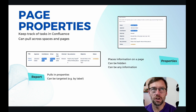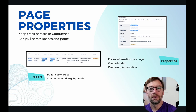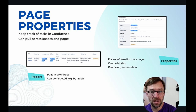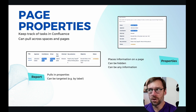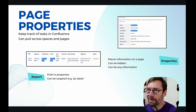There's another macro I like to use, especially when I have multiple projects, called page properties. This is an area on a page that can include information like the project owner, main stakeholder, objective, and status — and it can be pulled onto another page using the page properties report. So I can have one page that shows me updates on every project. This works really well when working with multiple project managers, and it's very useful for stakeholders — I can give them one page with all the information they need that just automatically updates.